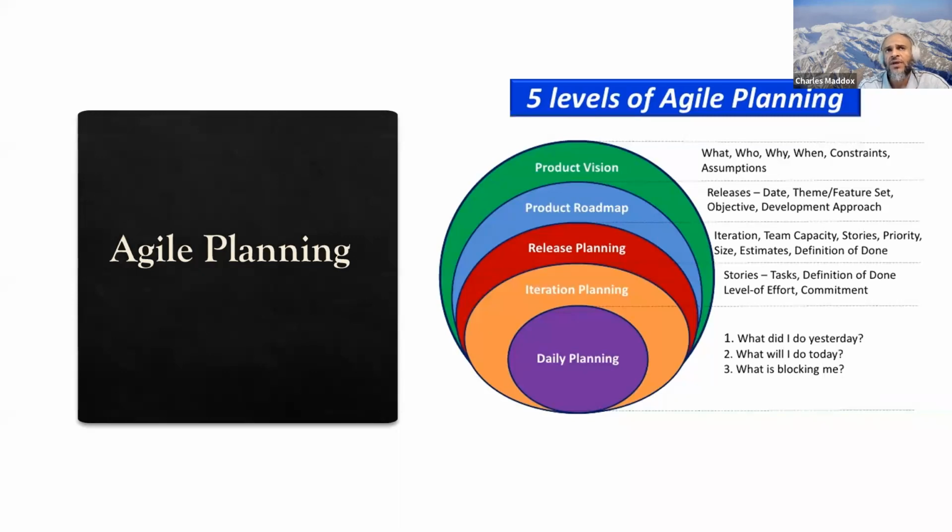So we identify this initial deliverable from our big aircraft company as a vision and a roadmap of when they need it. The roadmap defines the milestones and delivery dates, whatever we have contractually signed up to deliver to that aircraft company. We've gotten that contract and the overall project scope identified up front at that point.